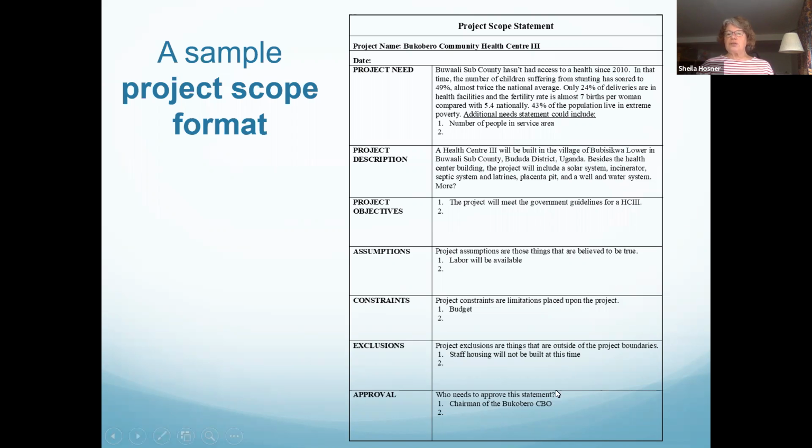And I think what's also very, very important is to look at what the project won't do. That helps you prevent scope creep. This project will not be addressing staff housing. And that's really important to understand, what it won't do. Staff housing is expensive. That would cause a lot of scope creep if we were expecting that to happen. So I suggest that you consider this, and just for your own benefit, try to think of other reasons that would fall under all these categories.